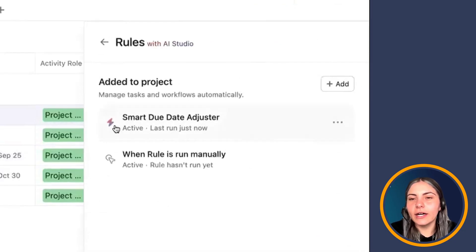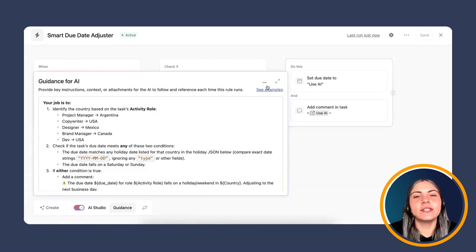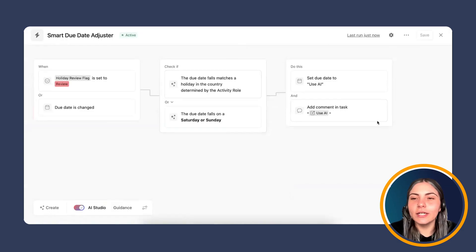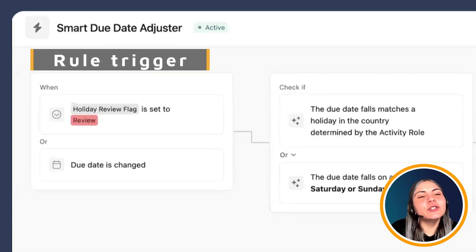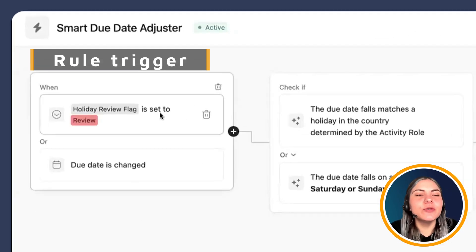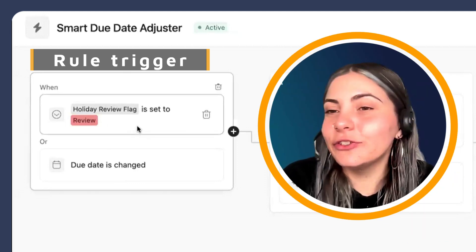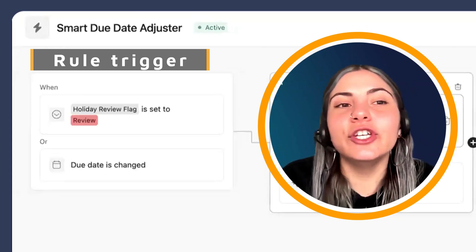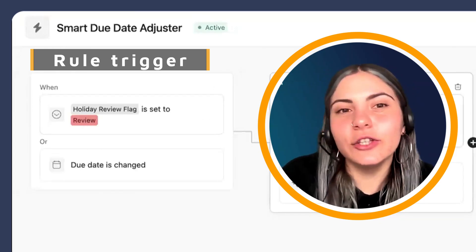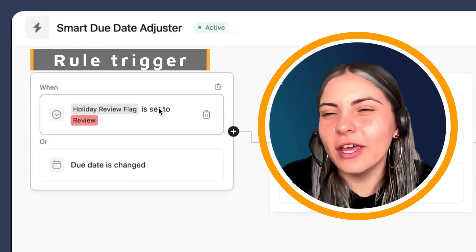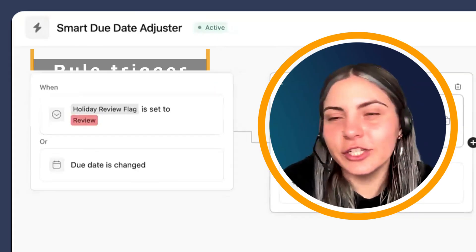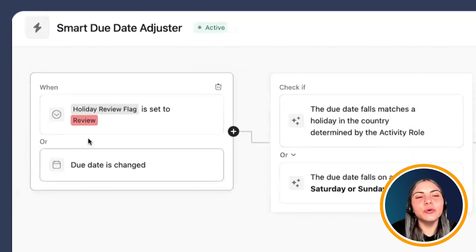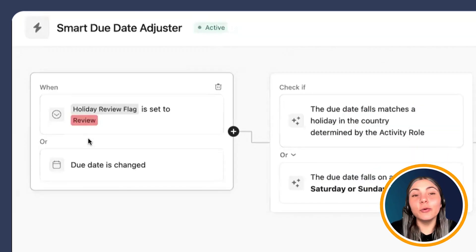I'm going to open up the rule — we're in the Smart Due Date Adjuster. Before reviewing the guidance, let's look at the rule setup. For triggers, we have two. The first is the update of the Holiday Review Flag custom field: when it is set to 'review.' We're using a combined trigger here, so rather than adding the condition separately, we're doing it together in the trigger. This is an update that's been available for a few months and works well with AI conditions. The second trigger is when the due date is changed.